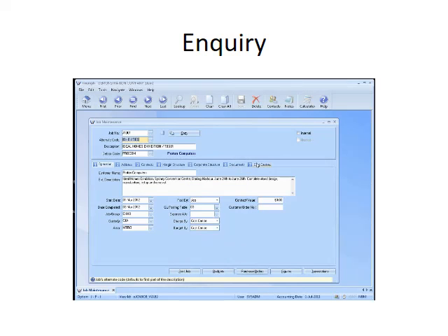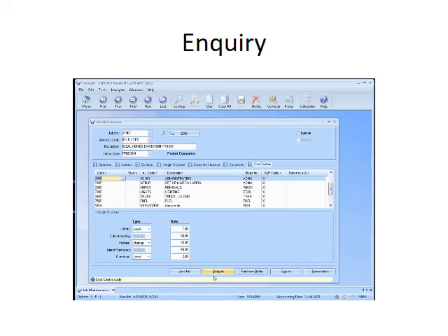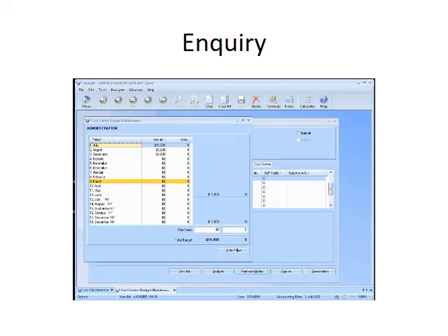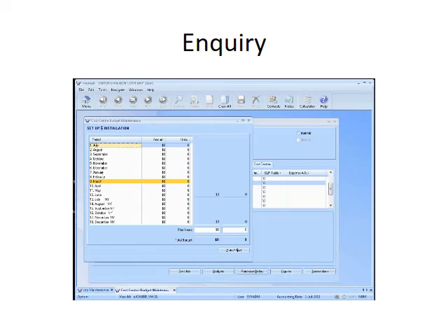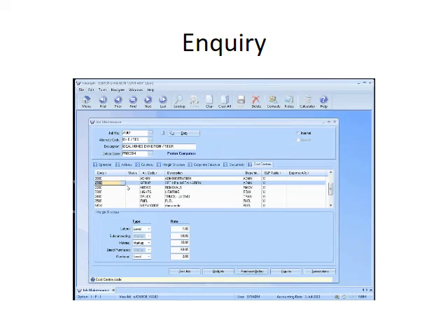If I click through into cost centers for a moment, because we click the budgets here on this cost center, it is only giving me the budgeting for that cost center rather than the whole job. So I can look at budgets to set up an installation. My budgets in that case can be down to each cost center with the same level of detail, or on the whole job.